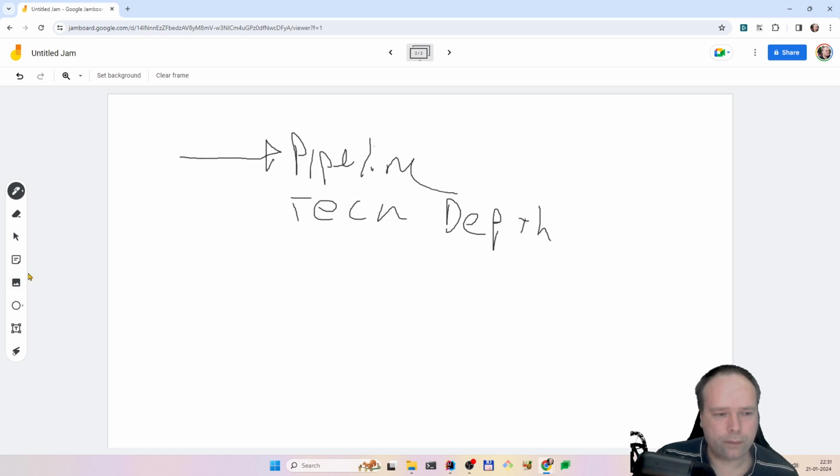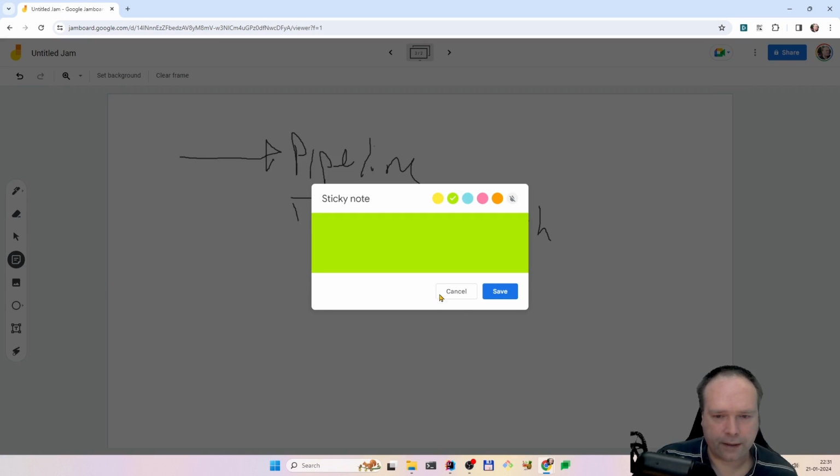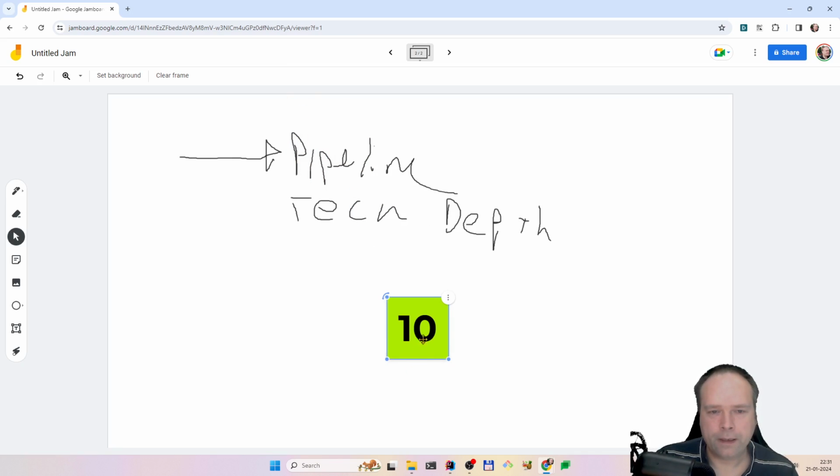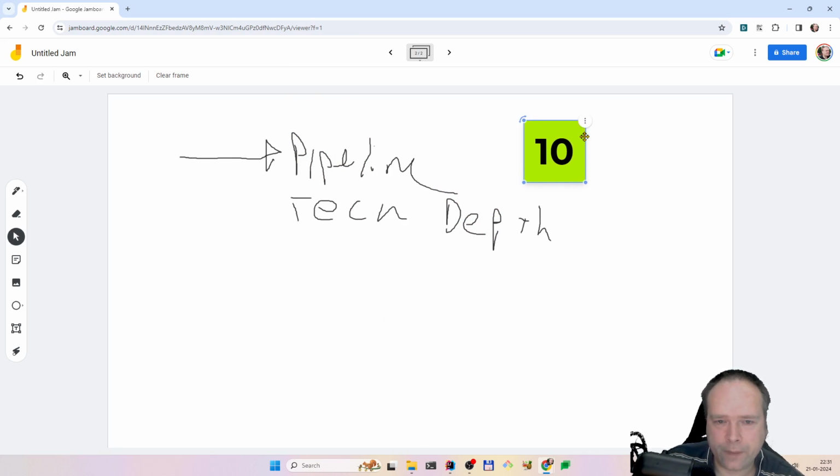And again, it should be time based, right? It should be time boxed. So here we'll say again, maximum 10 minutes. I think I would say that is the maximum for this. So take 10 minutes where all of the developers discuss the pipeline problem. Maybe sometimes it's a very easy fix, and everybody agrees on what should be done. Maybe we need to create a new Jira where we go from Jenkins to Bamboo, for instance.